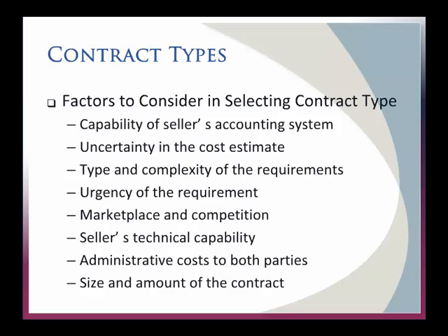So I might make my decision on what type of contract based on the ability of their accounting system. For some of the accounting that you're going to have, certain contract types, if the company's not capable of accounting, let's say hourly by project, etc., a certain type of contract is going to put such a burden on them to execute. They just don't have the infrastructure to do it. Don't put them in that situation.